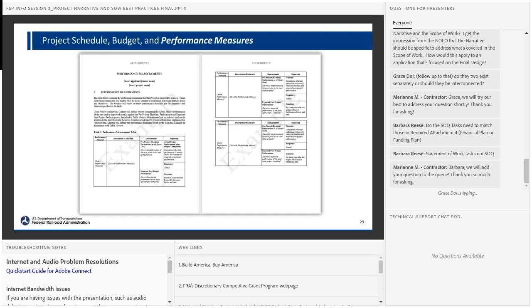We have a list of prospective performance measures that we can choose from. However, when you're filling this out, my recommendation is to look at the project narrative, see what you claimed the project would accomplish, and then choose performance measures that would help you establish that those benefits have accrued.